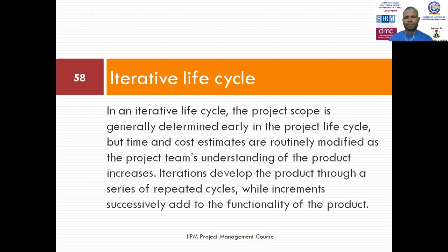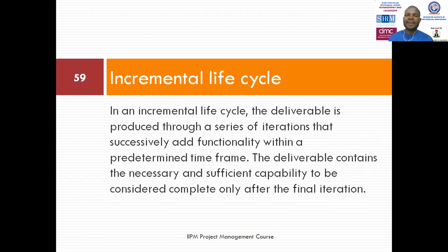All right. Then you have the incremental life cycle. The incremental life cycle and the iterative life cycle seem to be the same. But the major difference could be that in the iterative life cycle, we have the product and we are constantly reworking the whole process again and then adding functionality to the product.